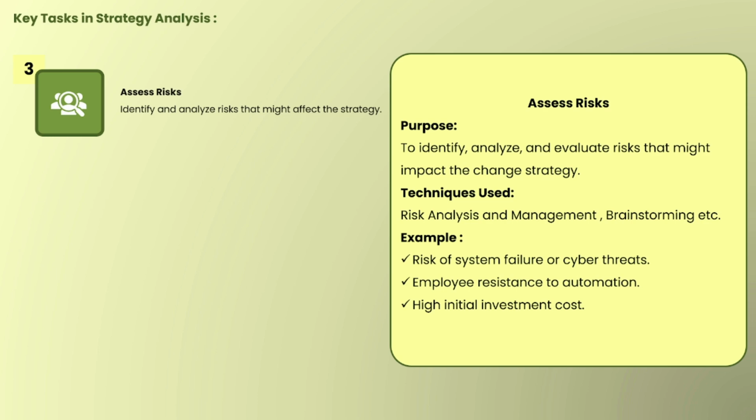First we identified the risk, then we analyzed the risk, and once we have identified and analyzed, now we will evaluate the risk. So we decide what to focus on first. First we will focus on serious stuff like data breach, which needs strong security right away.